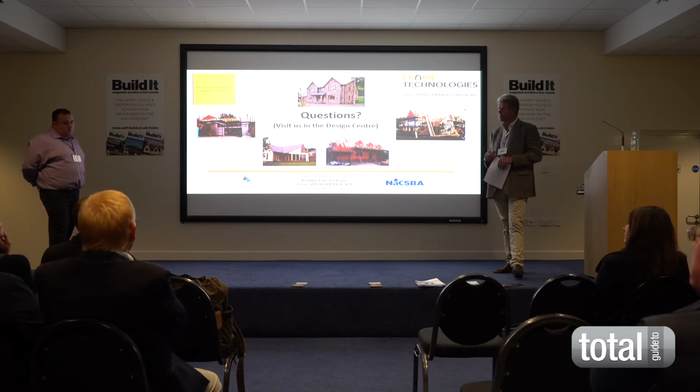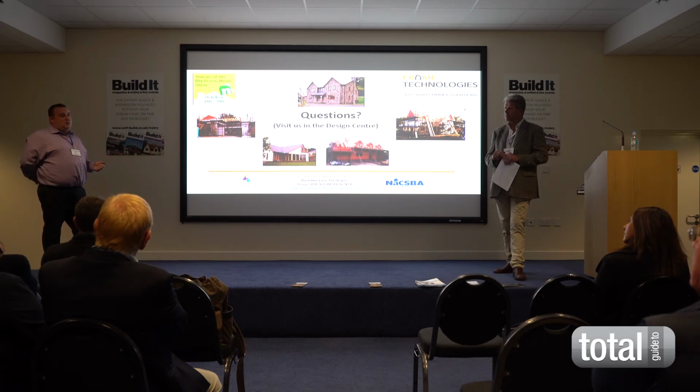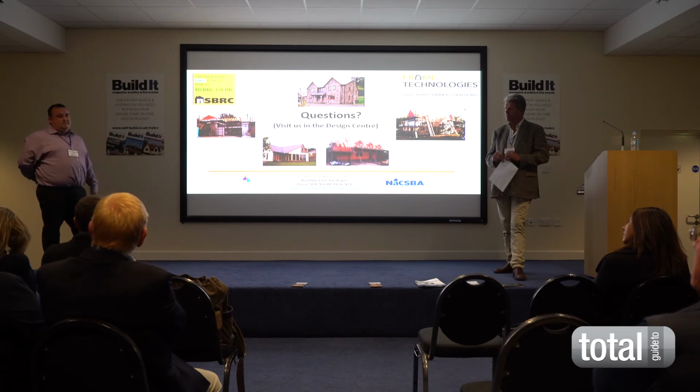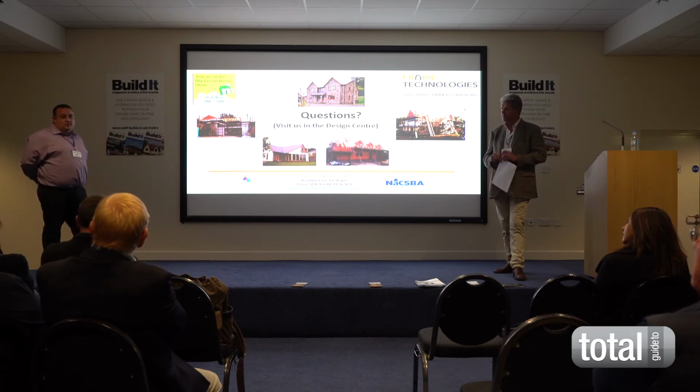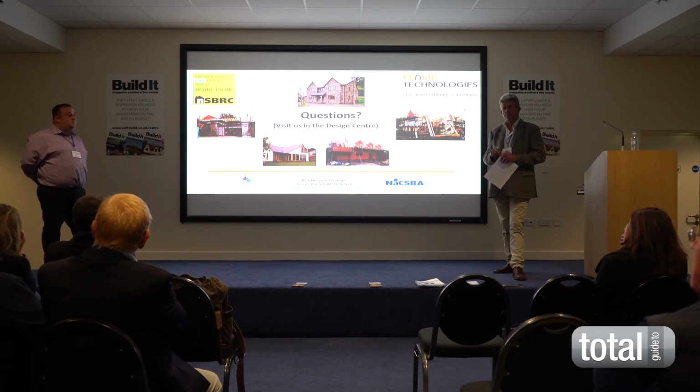And we had some quotes coming back and they were asking us to supply steel frames, plant hire, accommodation for the guys to come down and stay. And it just gets a bit too much on top of what the quote and everything is then. So it is important to look through and see exactly what it is they're giving you, because they can vary a lot.